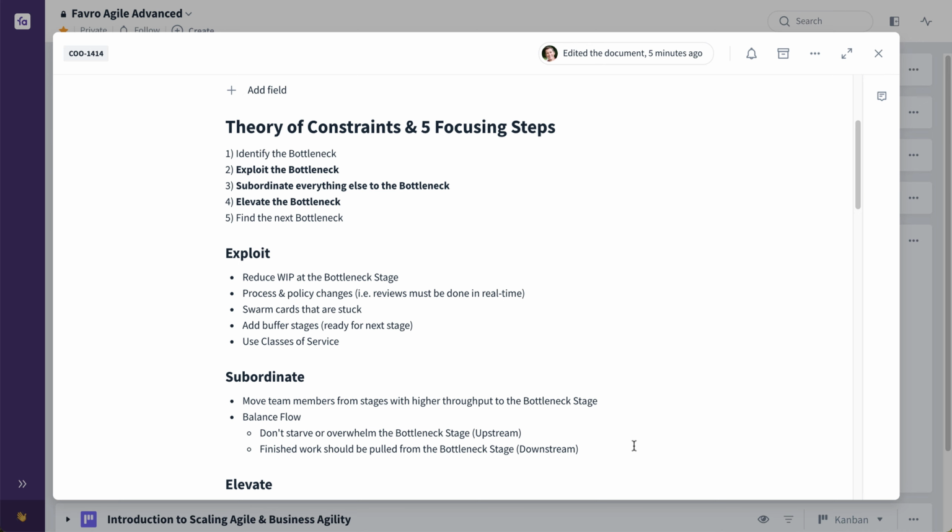It could be as simple as taking resources or team members from those surrounding stages and having them focused on that bottleneck stage. Of course, that assumes that maybe you have T-shaped people, meaning you have people who can perform the various disciplines at all the different stages. Or it might mean moving people from a similar team to this team who have that particular discipline.